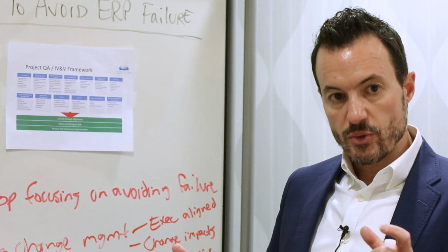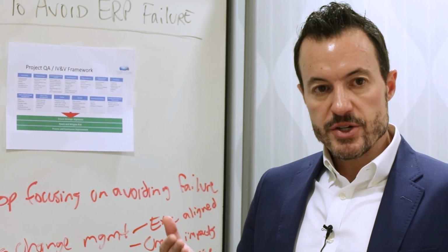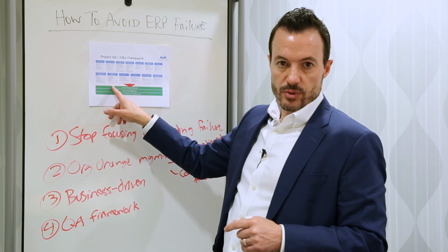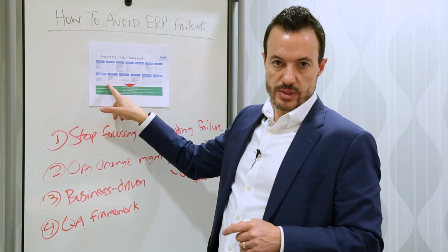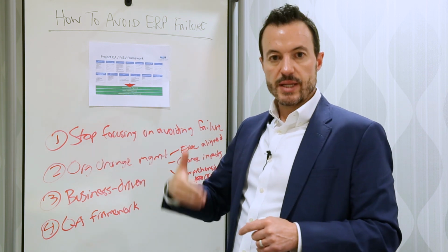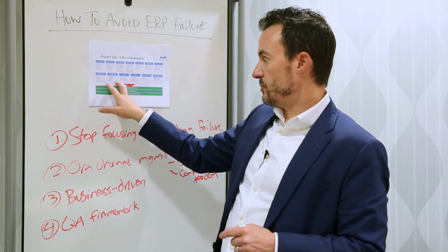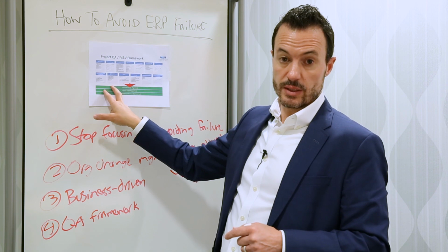In fact, if I had to pick two things that are going to delay your project, it's either going to be master data management or even more likely organizational change management. Those two things are the most likely to delay your project and increase your costs. So the sooner we can start those two things and do those two things really well, the better off we're going to be.